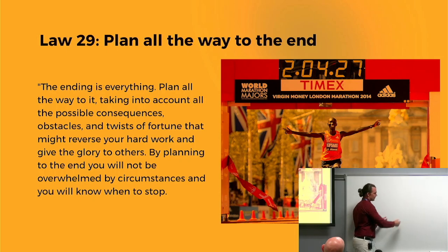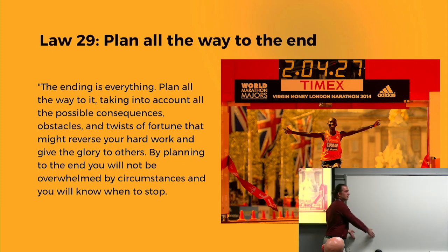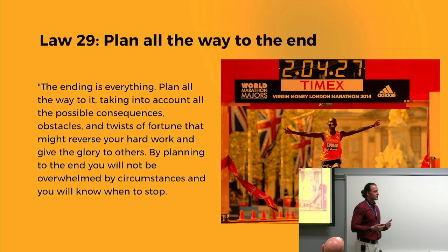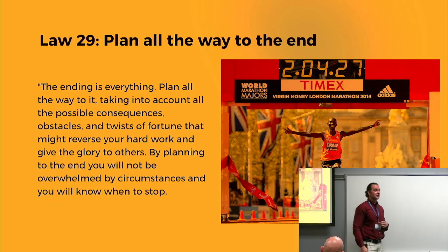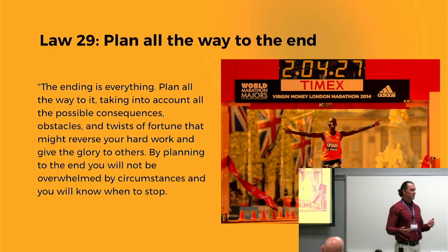She comes back, yep, we need to do this. No, you can't do this because this team needed this. Oh, okay, let me go work on that. And then another week gone. Hey, I got this, great, now go back to this person. Okay, delivered. Now you're three weeks behind. And that's kind of the reality of things. Just like that, one person's gone, you can't execute and build this. So you need to have a bulletproof roadmap, and you need to account for all the edge cases, right? That's really important. And when you do that, the work pays off.